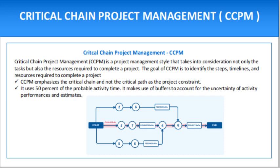CCPM looks at the schedule and determines which set of activities, if delayed, will extend the end date of the project. In this way, the critical chain is identified and you can pinpoint the steps and resources needed to complete a project in the fastest and most efficient manner. CCPM emphasizes the critical chain — not the critical path — as the project constraint. It uses 50% of the probable activity time and makes use of buffers to account for uncertainty in activity performance estimates. These buffers serve as a highly effective measurement tool for controlling the project schedule and are linked to the constraining company resource. CCPM also aims to improve the behavior of the project team, enforce early reporting of activities, and eliminate multitasking.